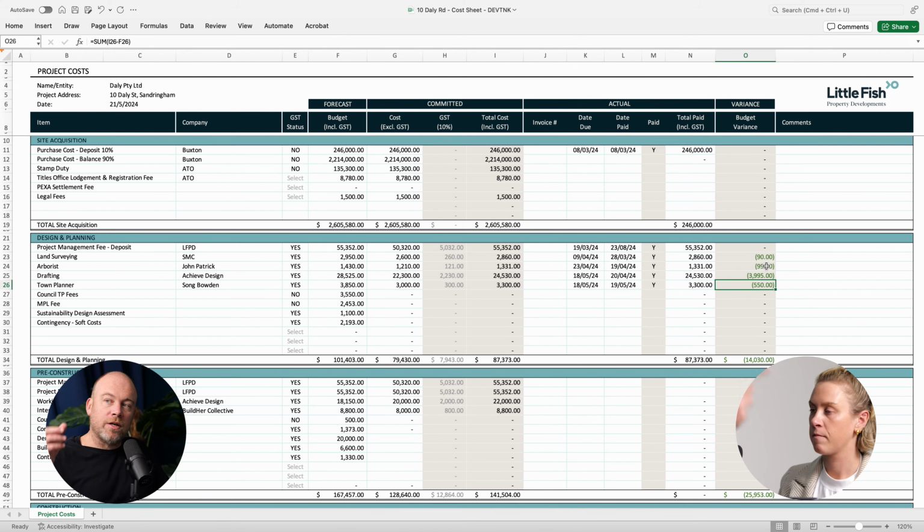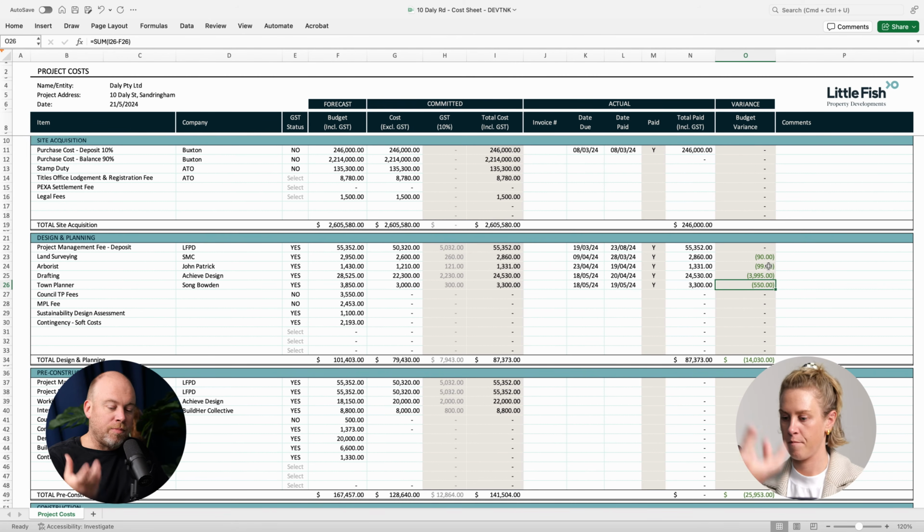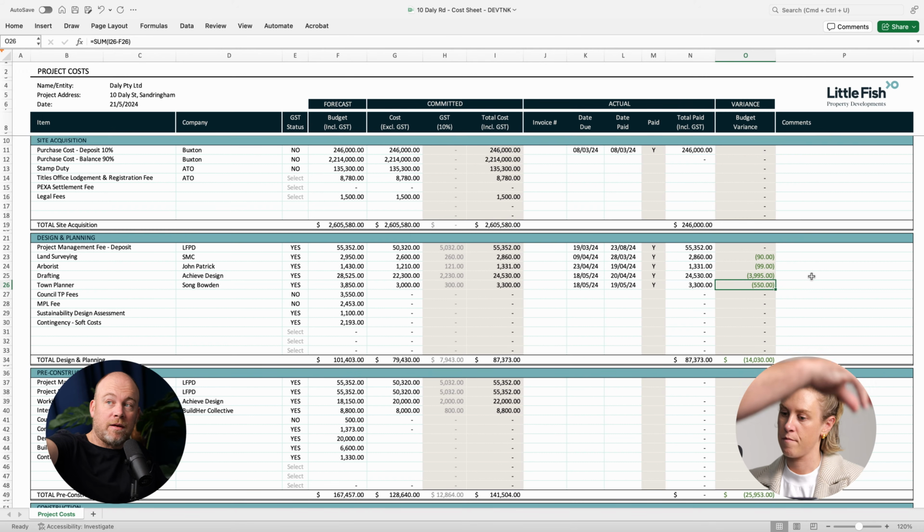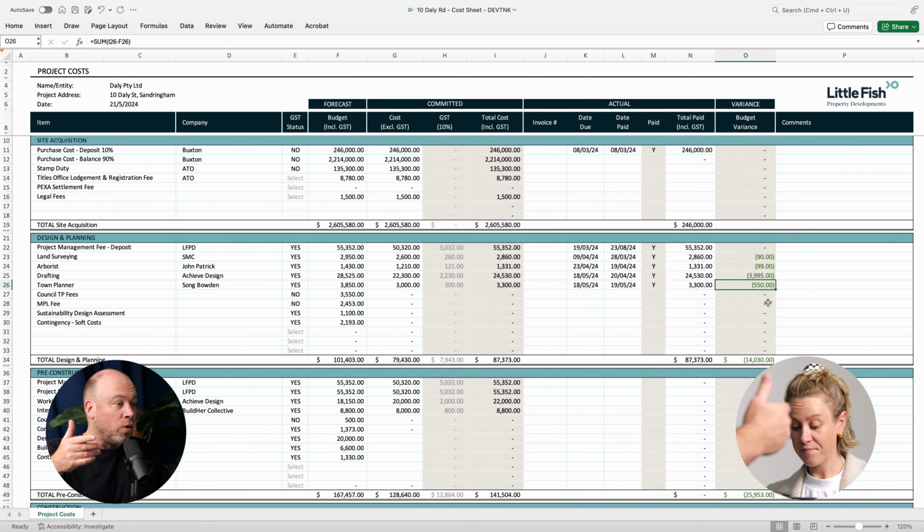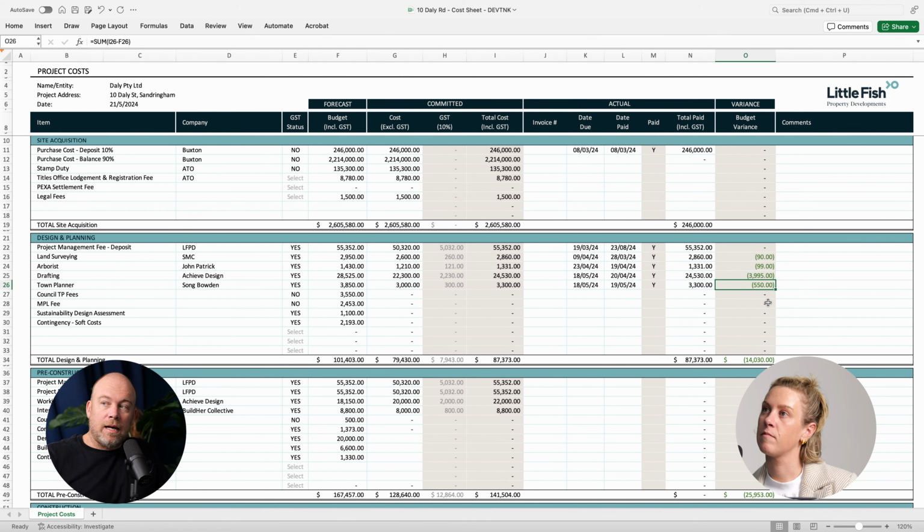Yeah, and it's a good one because when the team's getting proposals in, they plug the numbers into the committed total there. And if red's coming up on the other end, it can push you to say, hold on, go back to the proposal maybe and say, is scope right? Can we negotiate any more to try and hit budget? And if you can, great. If you can't, you can't. But the idea is that the projects team actually delivers on the budget that's been provided.